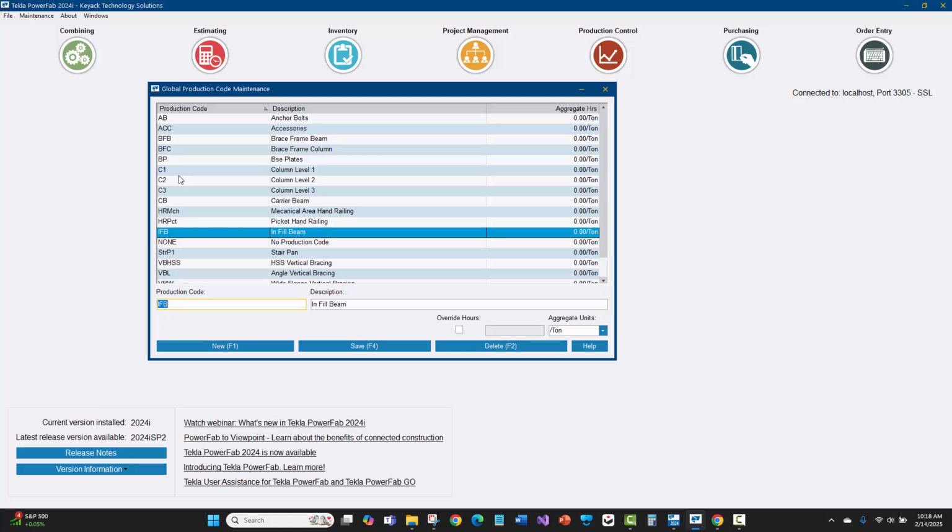Keep them very tight, keep it very clear what needs to be done, and then reinforce that through your detailing manual standards or your project kickoffs that, hey guys, you need to treat these production codes just like you would treat a material grade or a profile size when you're tagging parts in the Tekla model. So that way they can understand that, hey, this is super important. It's a very important property. You use it for planning. What is its purpose? Clearly identify what the different codes are for and just reinforce that the detailer needs to follow those.